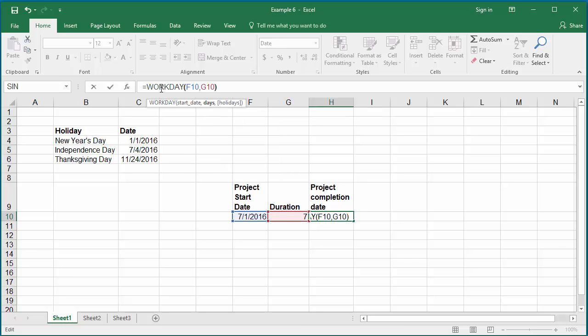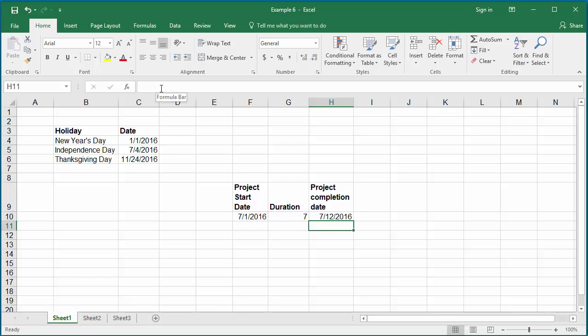...which contains the duration. Hit enter. You can see the date calculated excludes Saturdays and Sundays, but this doesn't exclude any public holidays which fall on weekdays.